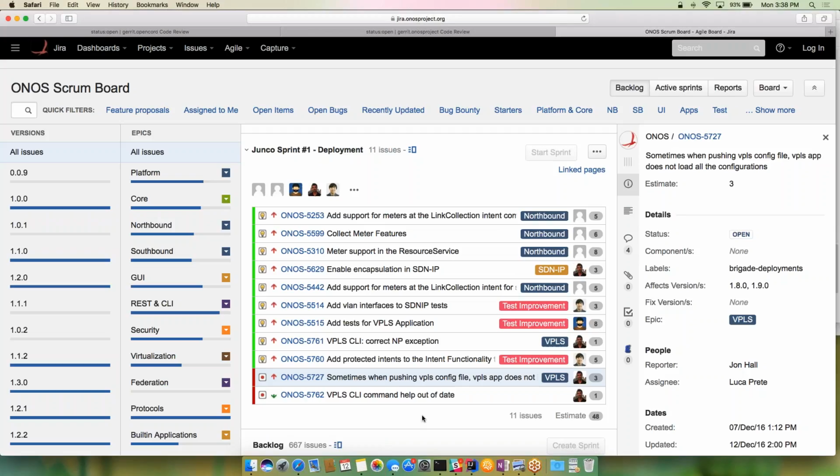So how many story points are these bugs? And are we saying that they're high priority enough that it's done alongside your dynamic config work? Probably 2 or 3 points for the intent bug. But it's hard to estimate, because we think we have a handle on what the solution is, but we haven't yet gone through testing. So if we're wrong and it's actually something else, then it could potentially be more.